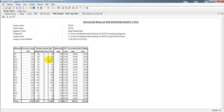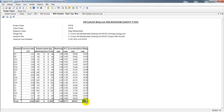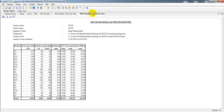The report shows footing-wise details: for different column types and different footing types, it gives individual values. You can see the volume in cubic meters, reinforcement required at different locations, main linked reinforcement and free face reinforcement, total shuttering in square meters, plain concrete, total excavation work required, and total backfilling required. It provides a very detailed breakdown.